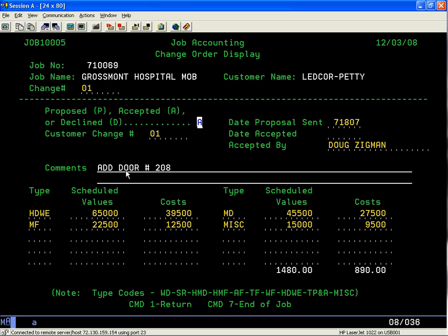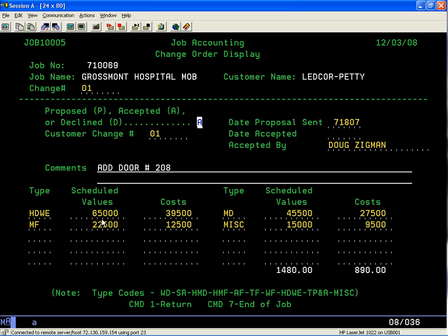This is important because it will come out on a report when you submit your pay request application on a monthly basis. Down here at the bottom, we want to indicate that the change order adds opening 208. The hardware value is worth X amount of dollars, its cost is X amount of dollars, the metal frame value and cost, the door, and the installation.